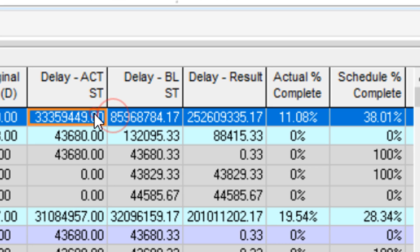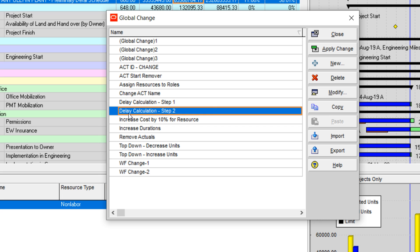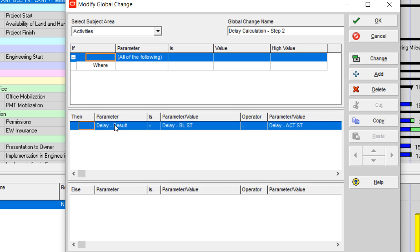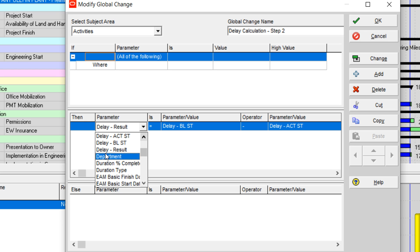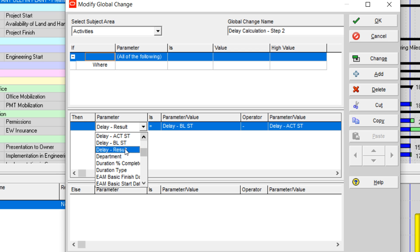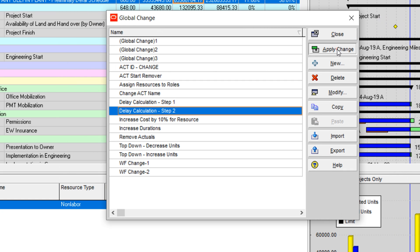In step 2, I will show you the delay baseline and actual change from date to number. I am going to modify the delay result. The reason I named the three fields starting with 'delay' is because it is easier to find this field in P6. Delay result equals delay baseline start minus delay actual start. I will apply the change.